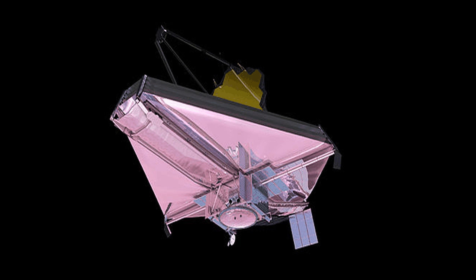Cost and schedule issues. NASA's lifetime cost for the project is expected to be $9.7 billion, of which $8.8 billion was spent on spacecraft design and development and $861 million is planned to support 5 years of mission operations. Representatives from ESA and CSA stated their project contributions amount to approximately €700 million and CA $200 million, respectively. A study in 1984 by the Space Science Board estimated that to build a next-generation infrared observatory in orbit would cost $4 billion.